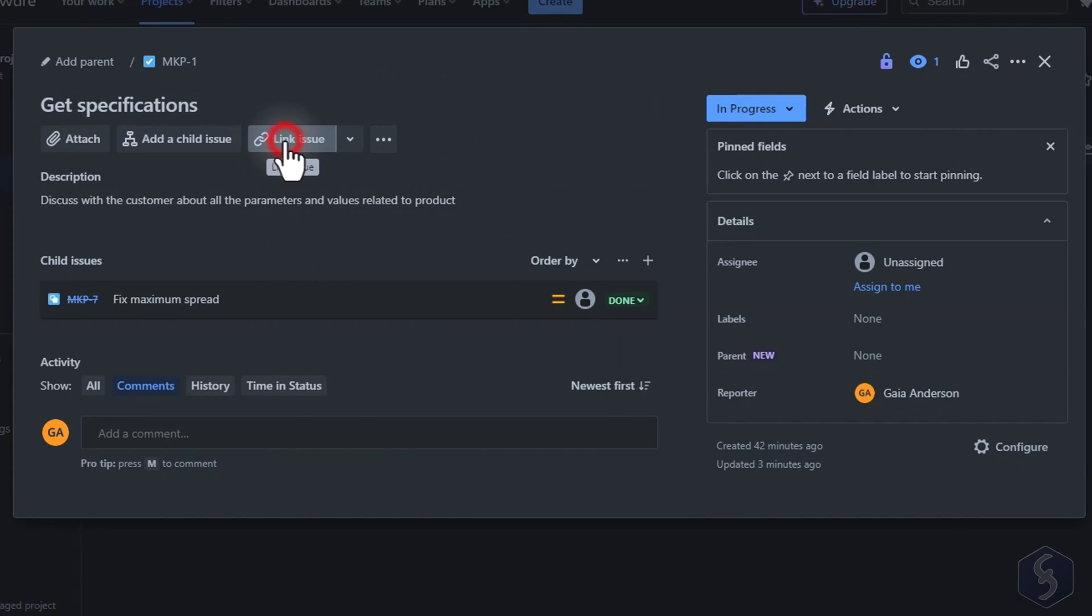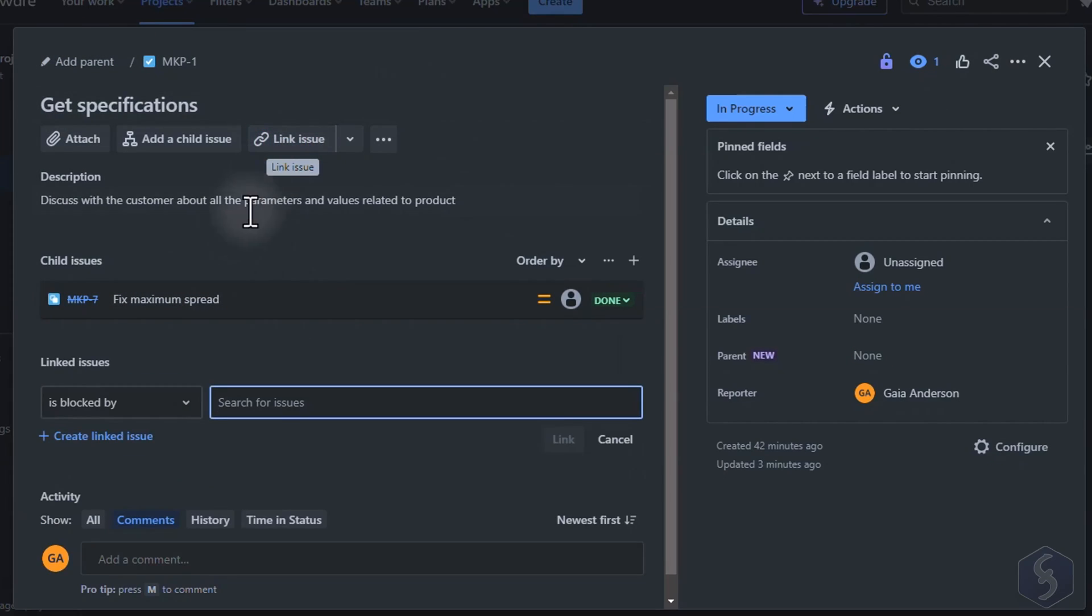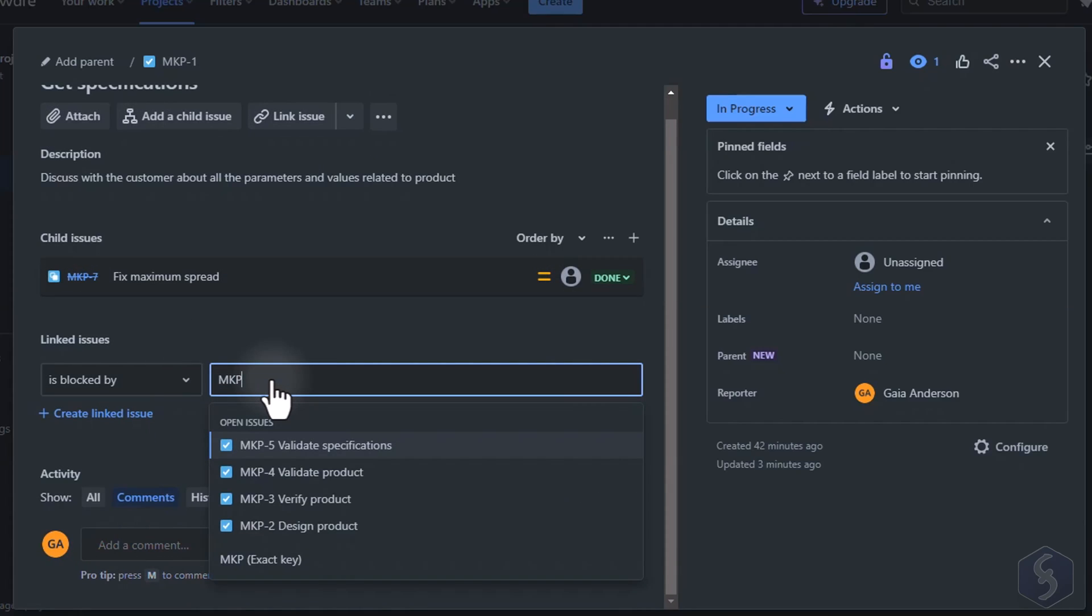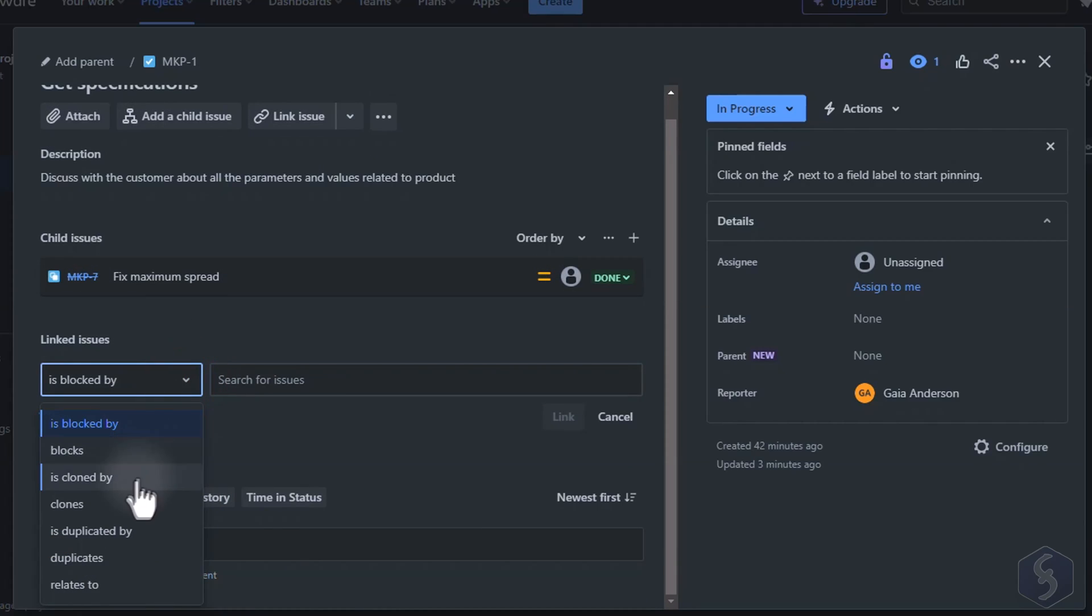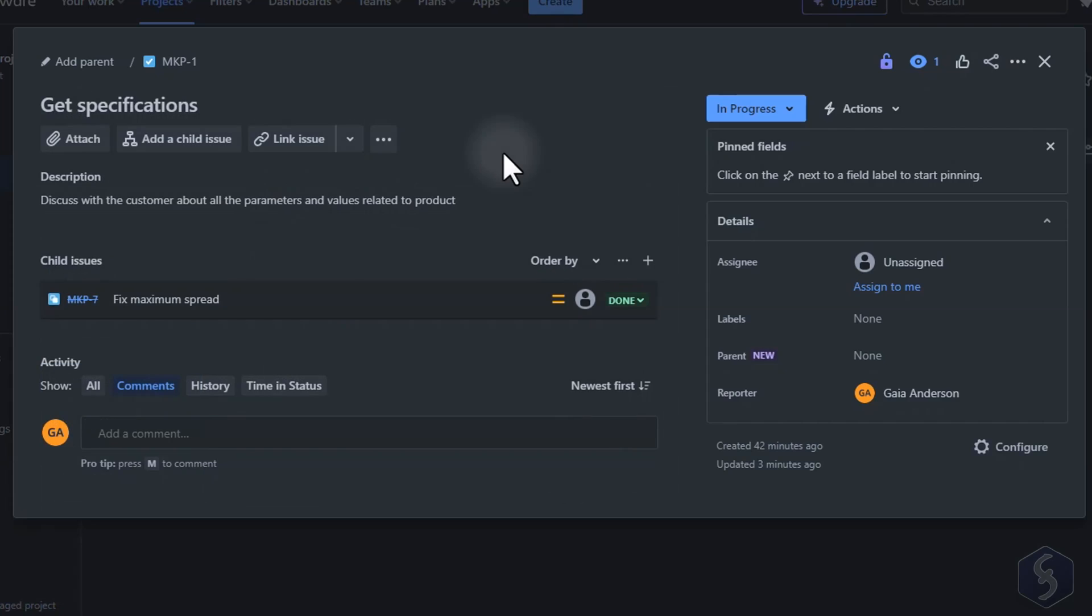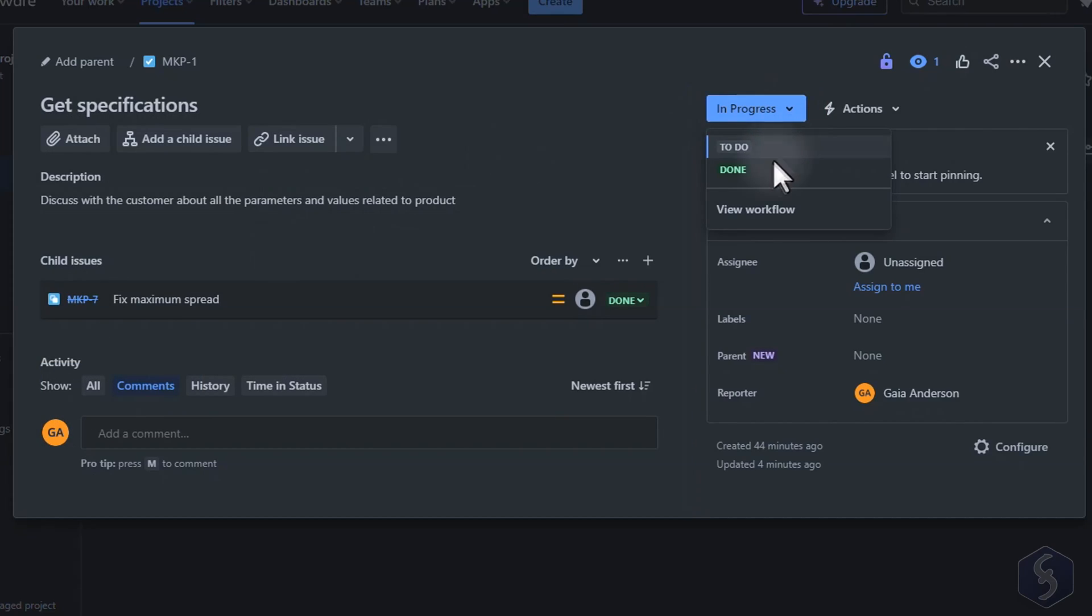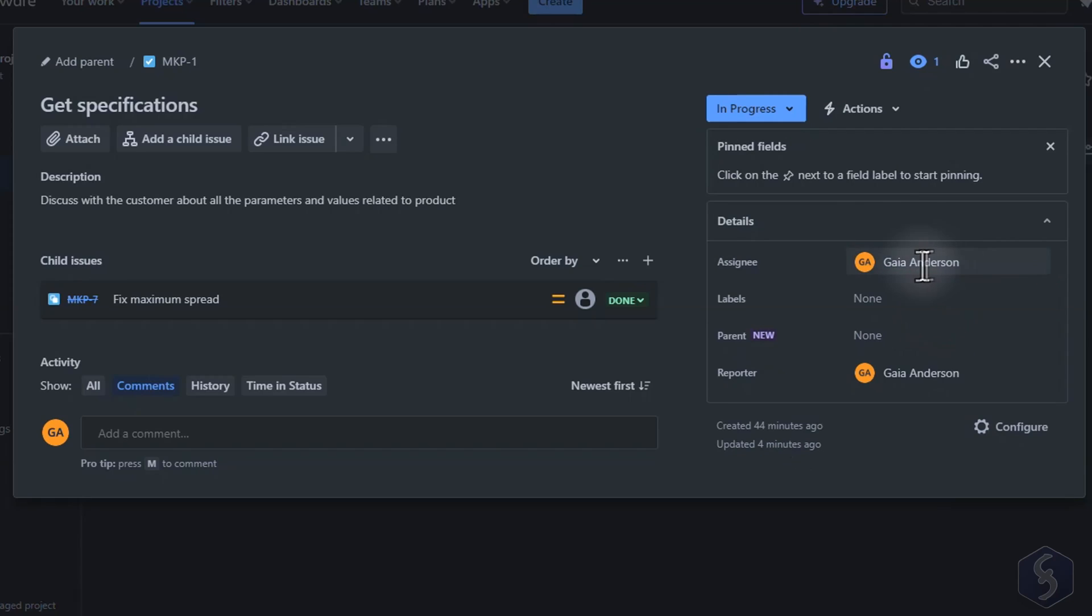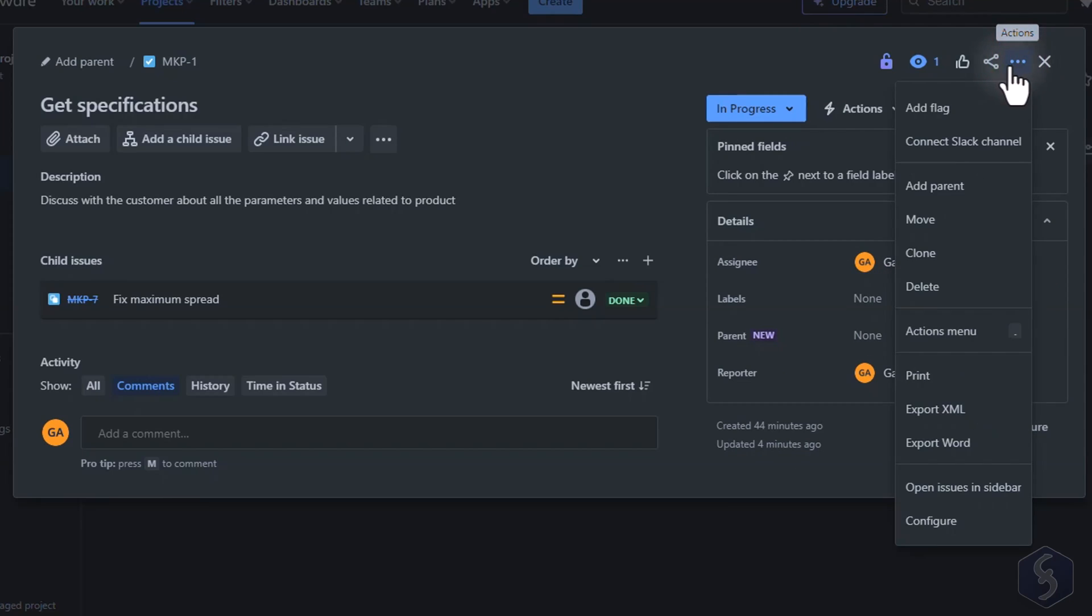Go to Link Issue to create dependencies between the current issue and others. On the right set Status, the Assignee and the person who reported the item. In the top right corner go to Actions to manage or delete the issue.